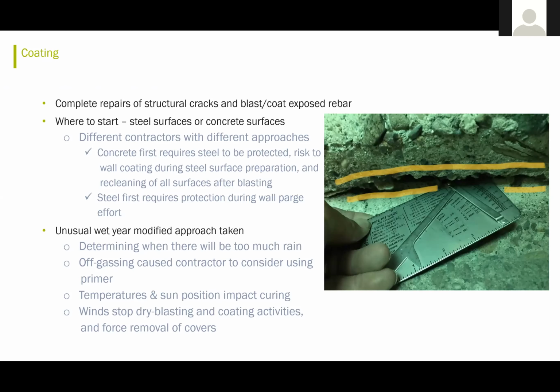They ended up having 2 different coating subcontractors. The first coating subcontractor lasted through 2 filters, and then he wanted out. And he was going so slow that the prime contractor wanted him out too. So they switched after the first 2 filters had been recoated, and brought in another coating subcontractor for the last 6. And he seemed to do a bit better job.